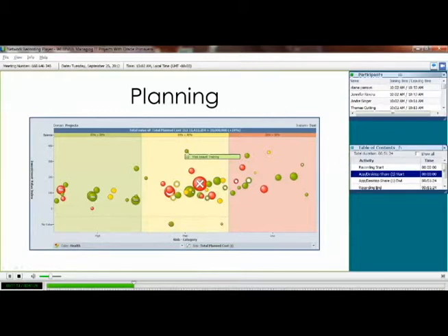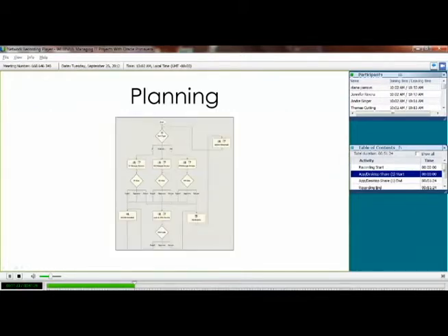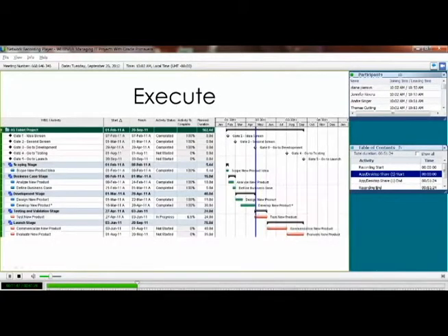And then once that is established, which are the correct projects, you can use the portfolio management application. He's got a workflow set up within here to establish governance and some standardization. So whenever a project gets selected, it goes through the appropriate approval routes to get pushed on, moving him now to the execute phase of the project, where he can set up a schedule.